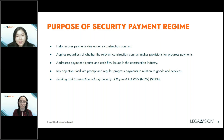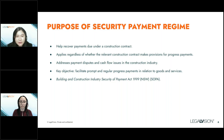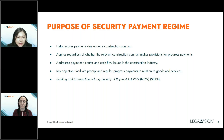The SOPA regime applies regardless of whether you have a written agreement or whether there's a provision for progress payments. It addresses payment disputes and cash flow issues, which are quite common in the construction industry, and applies to both residential and commercial contracts. The key objective is to help facilitate quick and regular progress payments and minimise delays in building works. New South Wales was the first state to introduce SOPA legislation, but all other states and territories followed suit. Note that SOPA doesn't apply to home building works where the homeowner is the principal — those contracts are governed by the Home Building Act.